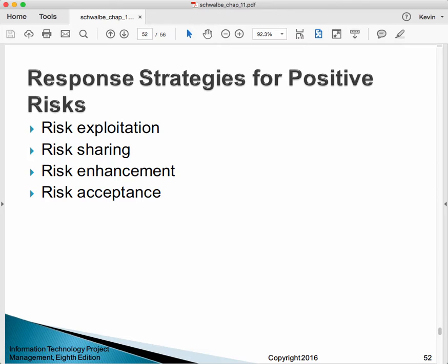They just were burning up a lot of gasoline for nothing, so long as they had to take the detour. And not surprisingly, the contractor was able to bring the project in several months early. It was a win-win. So by sharing the upside with partners, you can make the positive more likely to occur. Okay? It's sort of like the corollary to insurance.